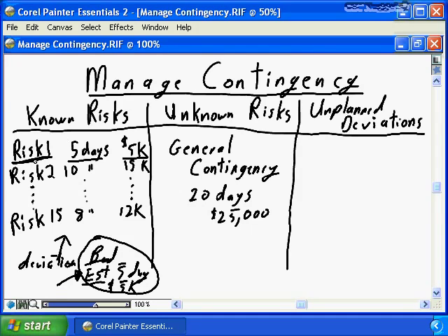You need to reserve each individual risk event, risk 1 through risk 15, the time allocated to each risk event independently, and only consume that time, those dollars associated with that risk event, when in fact the events around risk number 1 have happened. It's 3 months into your project, and you have determined that risk number 1 has happened, and you deploy the time or you deploy the dollars, or better case, the risk has not happened and therefore you have extra funds available.